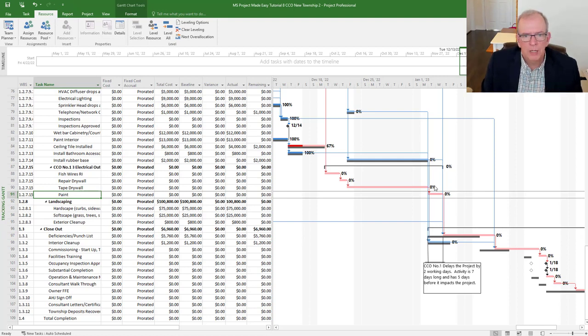I had one of my clients who worked for facilities, a senior project manager, works on $100 million, $200 million projects, was saying they had this contractor, a GC, and even on that level of sophistication, said, well, we have 5 change orders, so we want a 5-week extension. And the project manager said, no, we're not giving you a 5-week extension. The contractor said, well, each one's 5 days. So that's a week, and we've got 5 change orders. That should delay the project 5 weeks.